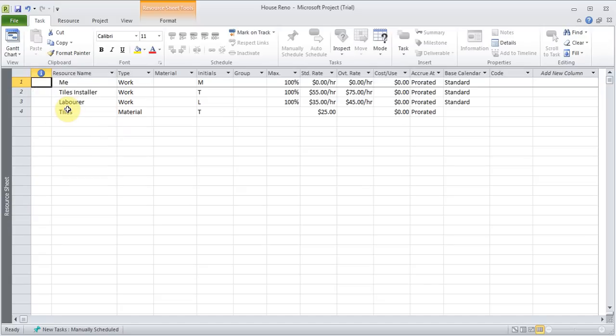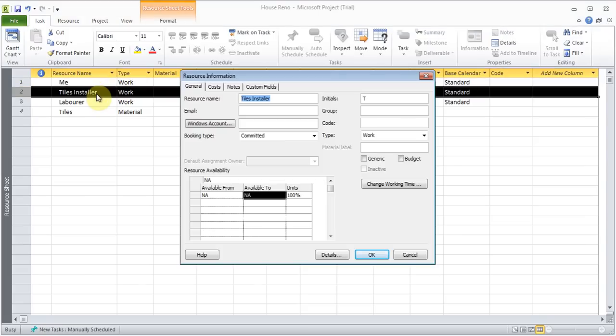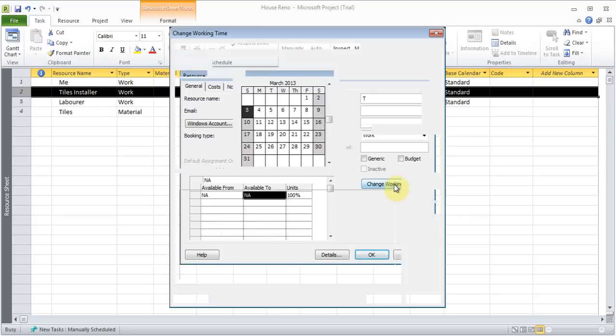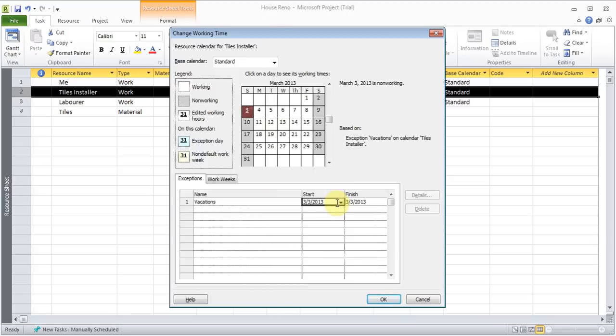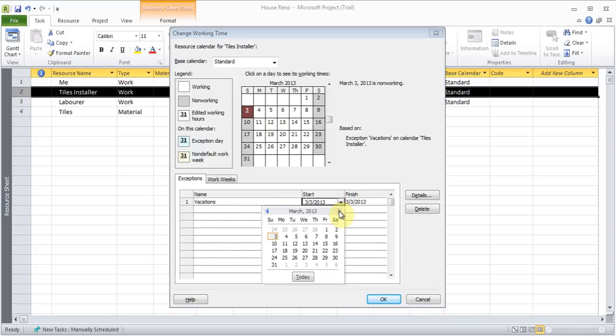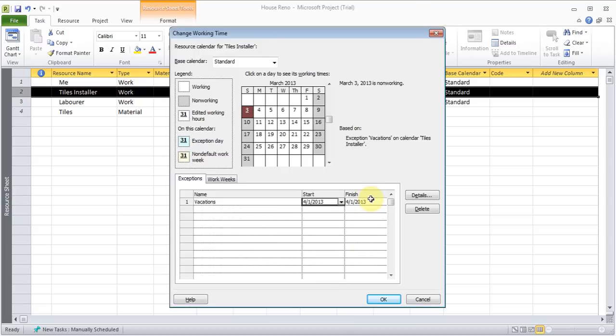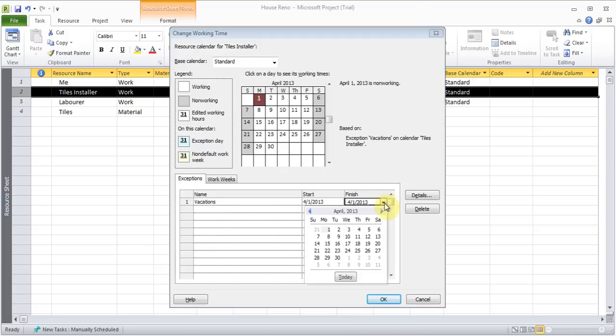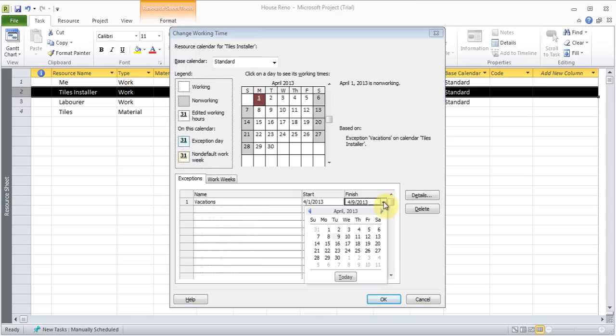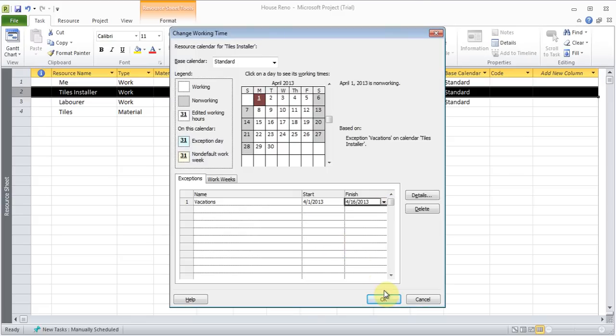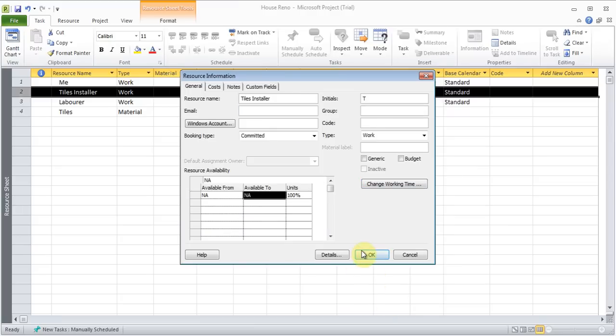Now for some reason. One of these guys. Had a problem during certain time. They were going to go on a vacation. Or they were. Their prices changed. So say for example. The tiles come. If I double click on him. And I can go to change working time. And I can put an exception here. Say vacation. This guy is on a vacation from. Say. First. Till the. Nine. So this would surely have an impact. If he was scheduled to work. I think it would make it a little more. And I'll click okay. And click okay.